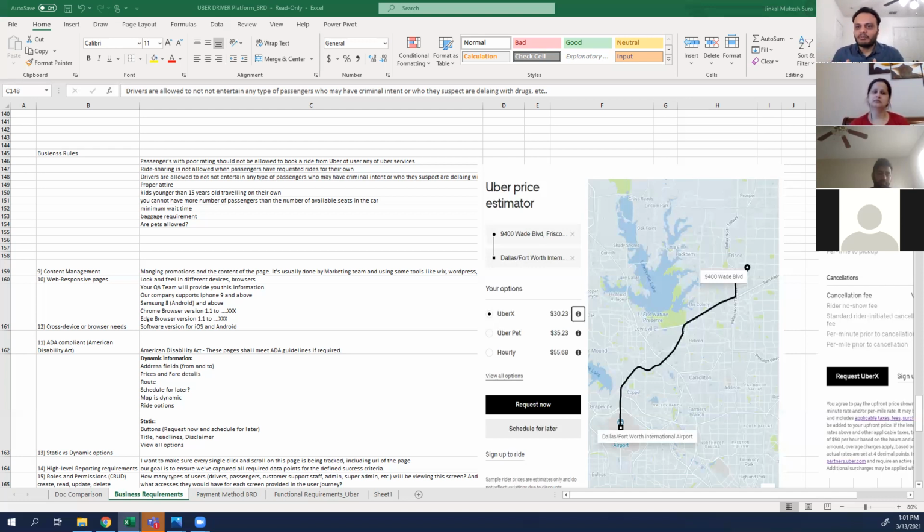So they try to strike a balance where, hey, if the product is about 85% or 90% ready, and if it is not going to affect a lot of customers, we can go live in the market the Agile way. That's completely fine, because we know that only a few customers are going to face these issues. And they constantly iterate after every month, they try to improvise on their product. And they fix those bugs after a month or two, and now everything works.